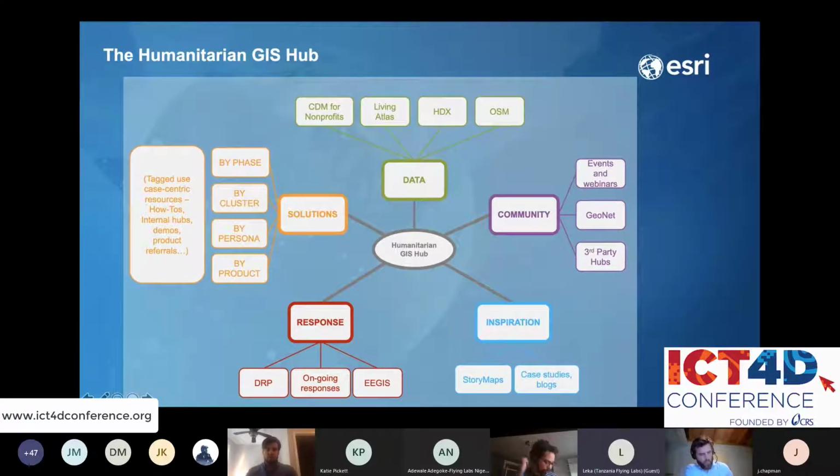Think of these as traditional title deeds. If drone data could support the existing process, which is kind of a long process because it involves surveyors, obviously, ground truthing. Just to give you a practical example, we were able to map an entire village that was approximately 35 square kilometers, 3,500 hectares, in a day, and this would take surveyors weeks. It would take more than one surveyor to do this in weeks, if not months. We were able to map it in a day using 2 fixed-wing drones.